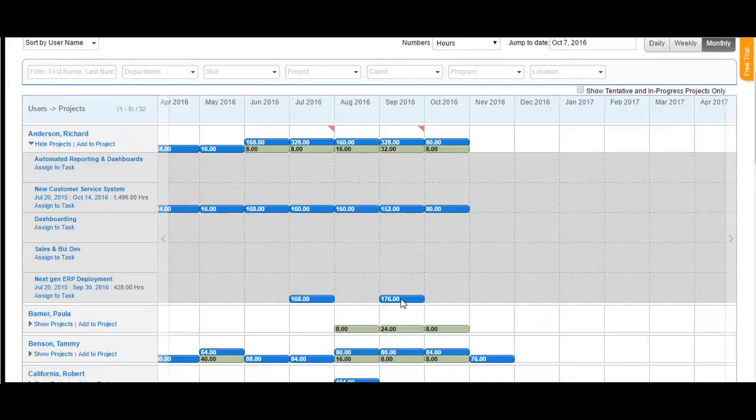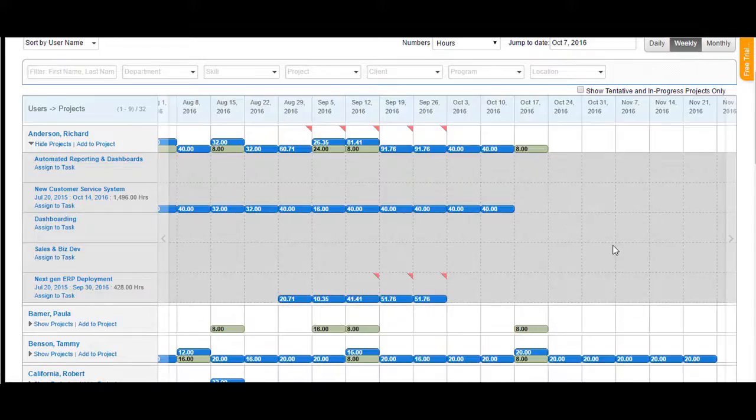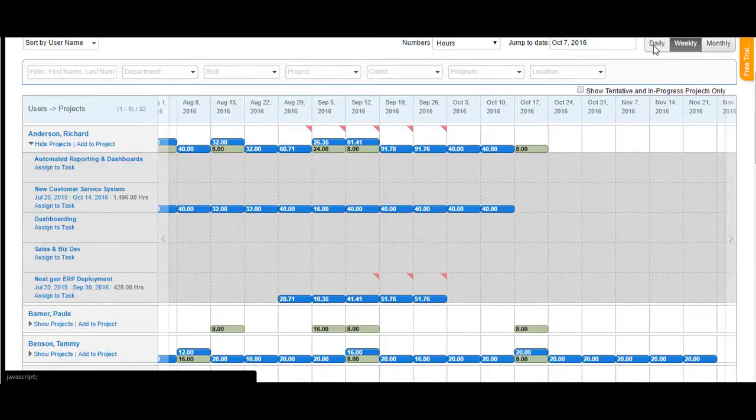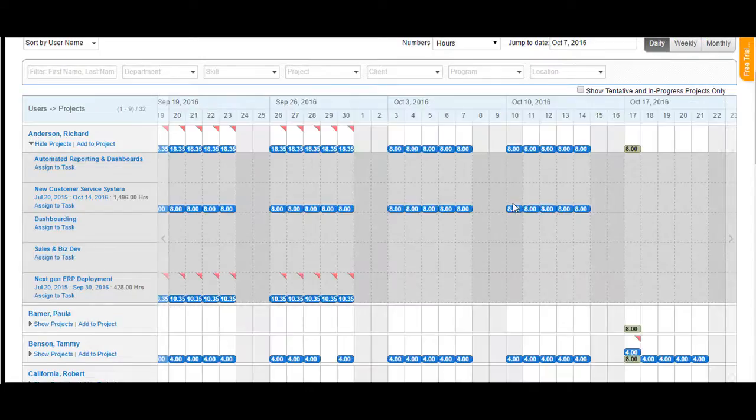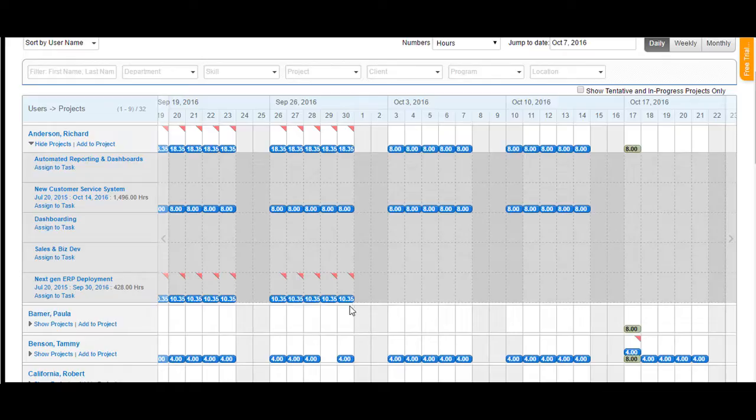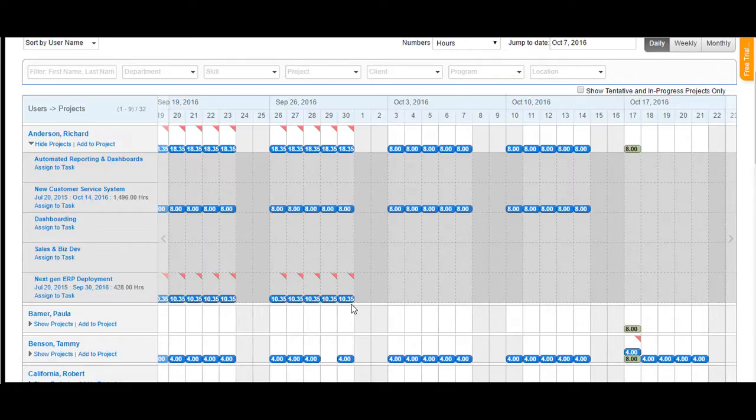So if I set it to total hours for the entire month and I say Add Allocation, you would see the total hours appearing here. However, when I change it to weekly, you would see it divided. When I change it to daily, you would see it further divided automatically by the system. This is how you can add an allocation to a particular project.